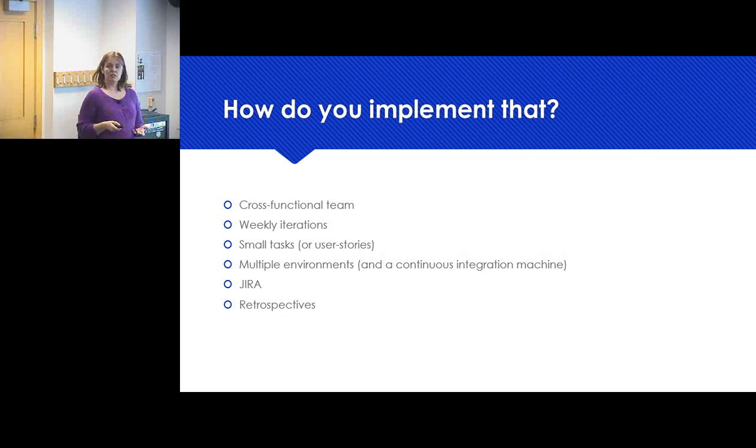Can you also just explain time boxing right now as a way to avoid big stories? So sometimes we have something that we can't give a good estimate on because we don't understand it well enough, or we think it's going to be really complex. So we might write a time-boxed story. What that means is we say, all right, I think I can learn more about this in a day, and then I'll be able to give a better estimate and understand this problem better moving forward.